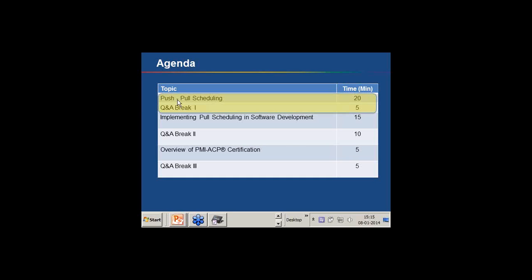When a person is working on project A, he would be working with one mindset. Whenever he takes the project B task, he needs some initialization and time. And if he keeps switching the focus multiple times in a day, the initialization time is kind of a waste. It is not adding direct value to the business. Still, the flow which we will be discussing in the second segment may give you some idea, and then we can take the follow-up question after segment 2.